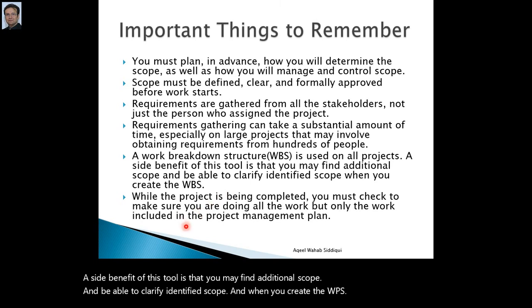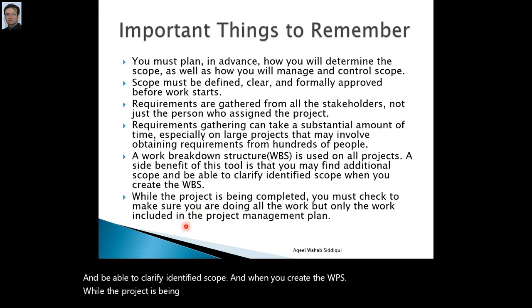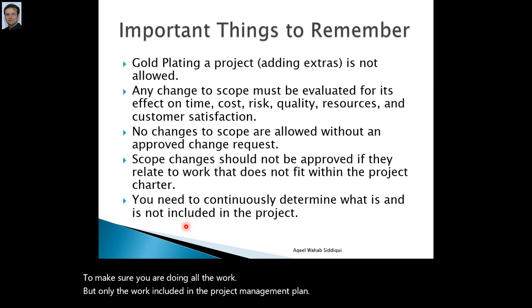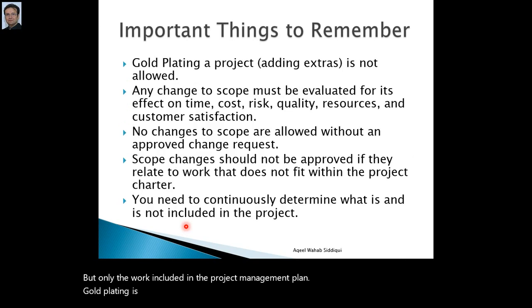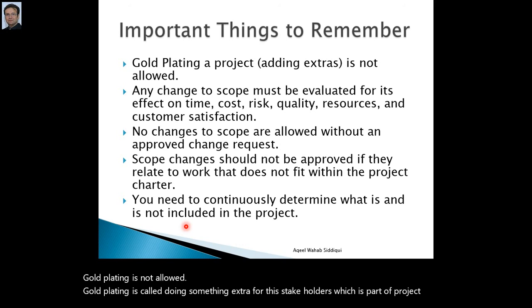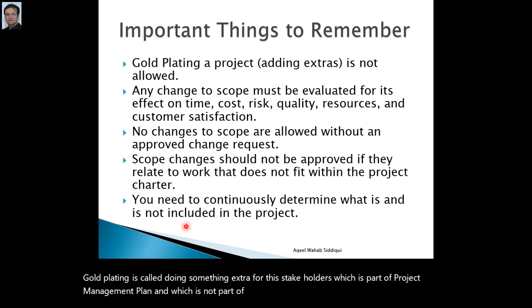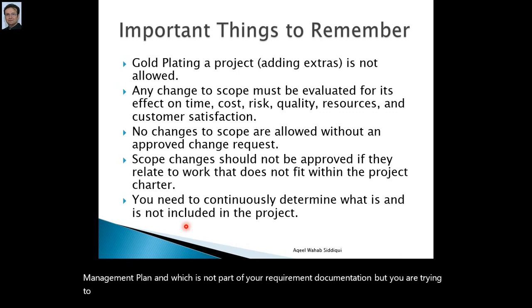While the project is being completed, you must check to make sure you are doing all the work, but only the work included in the project management plan. Gold plating is not allowed. Gold plating is doing something extra for the stakeholders which is not part of the project management plan and which is not part of your requirement documentation, but you are trying to do something extra to make them happy. This is not allowed in project management.